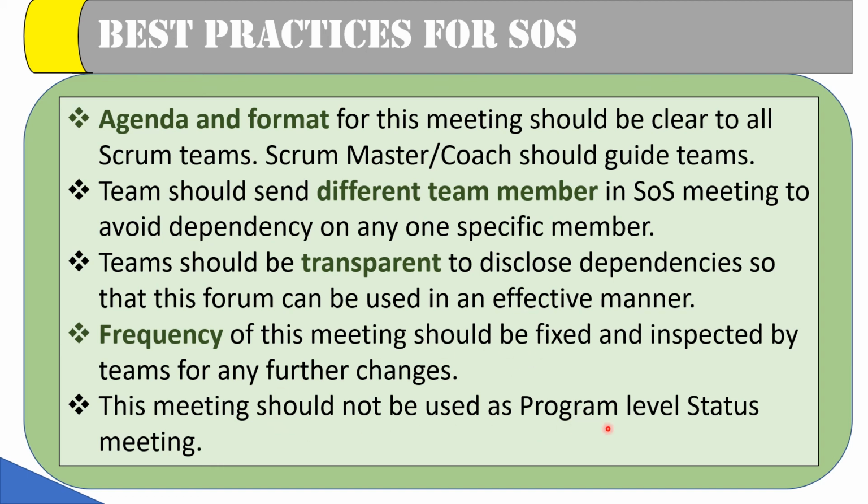This meeting should not be used as a program level status meeting. This is pretty important: it is not a status meeting where each team member comes and reports what their team is working on. The SOS forum should not be used as a status meeting or for reporting purposes.